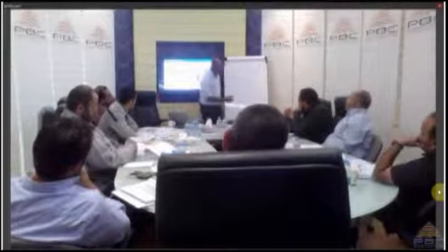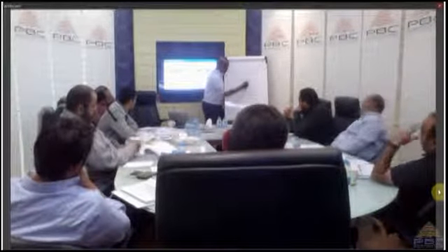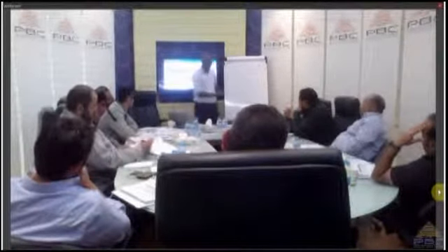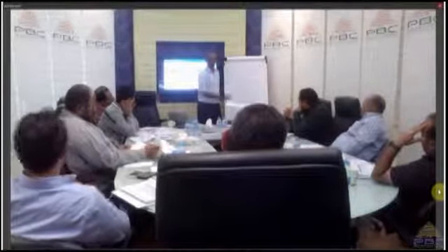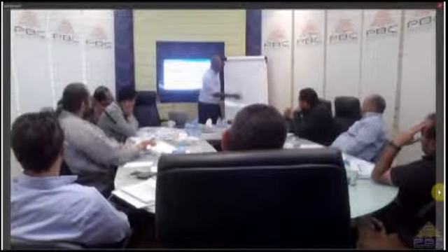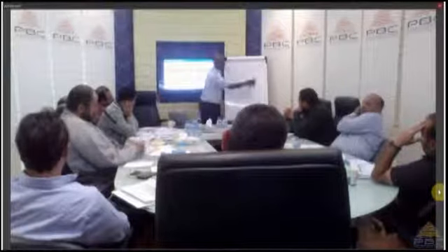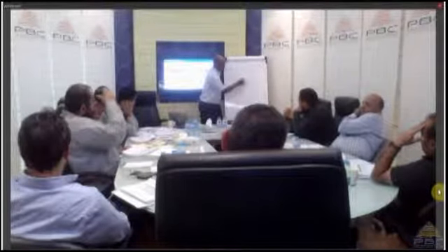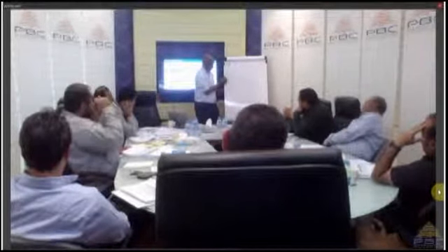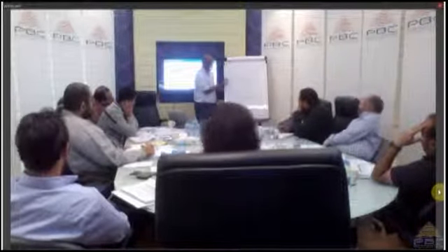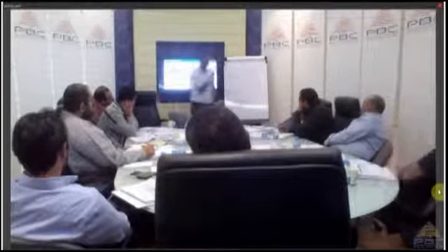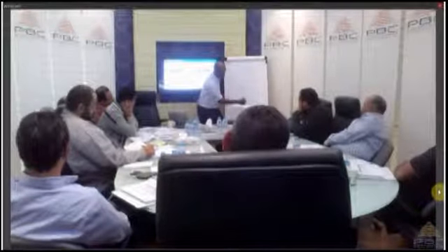So this is my baseline for my budget. So this is the cash outflow. This is how much money I need during the project, and this figure here reads what? The project cost. So the total. This is how much money I need throughout my 12-month project.